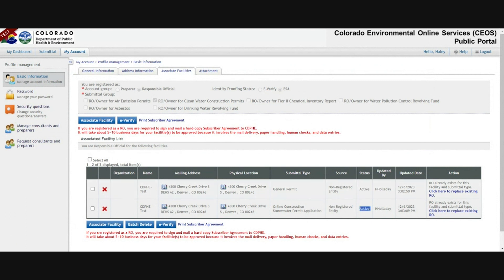The other status that matters on this page is that your facility is active. If it says pending, it means that you haven't yet completed either e-verify or an ESA. If it says inactive, it means that another responsible official in the system likely replaced you, which inactivated you. In that case, please give us a call and we can sort that out with you.